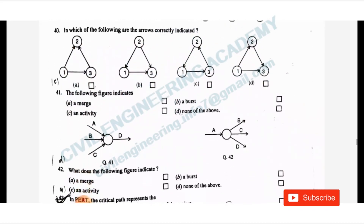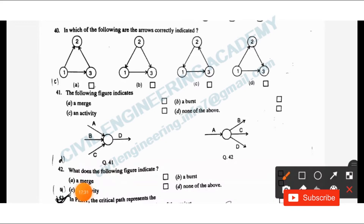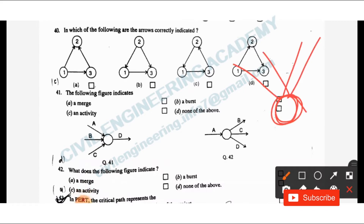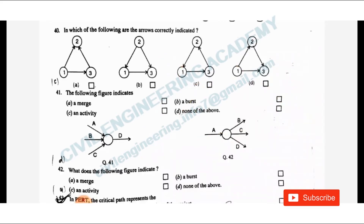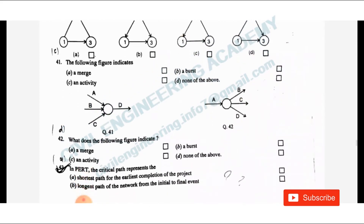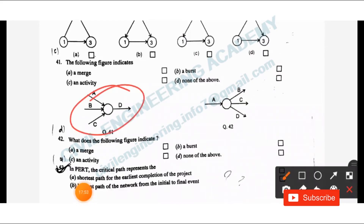Question 41: The following figure indicates merge or burst? Merging means multiple activities (from nodes 1, 2) converging into a single node 3 — this is merging. Question 42: the figure indicates burst, where one node branches out into multiple activities. So 41 is merge and 42 is burst.